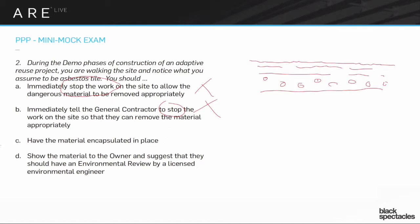Clearly the correct answer is D: show the material to the owner. Remember, you're the agent of the owner — your role is to bring the owner up to speed on anything important for them to understand, and then let the owner either get a phase one or, if they've already done a phase one, do a phase two. Phase one is a general review looking at the history of the building and documentation from the city. Phase two is more serious — actual measuring and testing of materials. For something like asbestos tile, you absolutely want to hand that over to the owner.